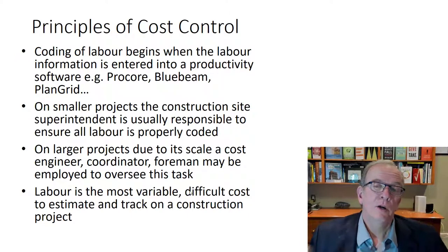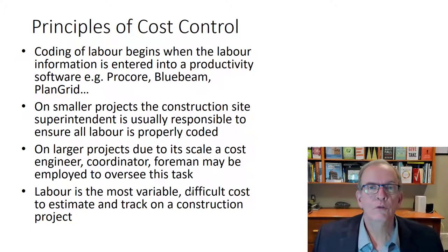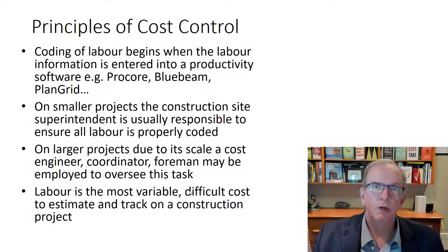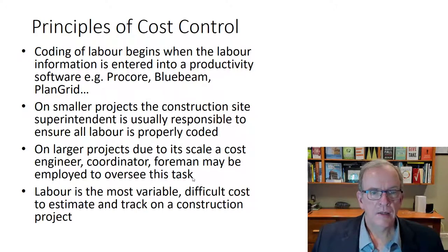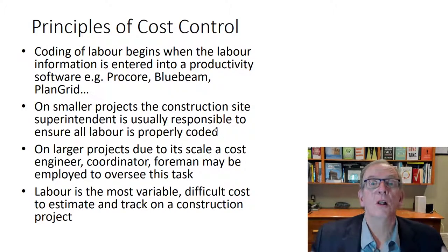So now you know, well, we expected the footings to take this much. This is the cost code for it, this many hours of work. And when we tally all the work that was done on that, it's more or it's less than that. So we're over budget or we're under budget with that. And usually on smaller projects, as I was mentioning, the super is usually responsible for making sure that the labor is properly coded. And on larger projects, you're talking about cost engineers, somebody that's assigned to that particular topic.